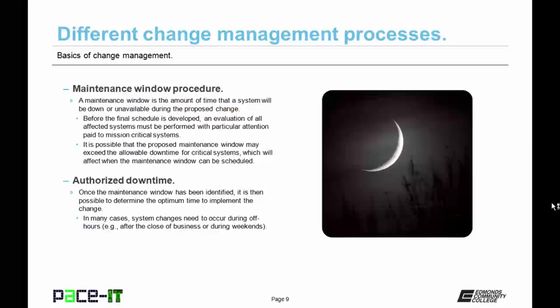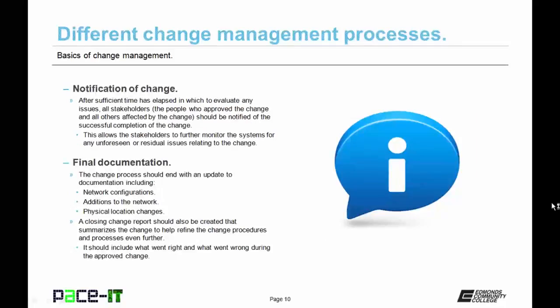A sub-procedure to the maintenance window procedure is authorized downtime. Once a maintenance window has been identified, it is then possible to determine the optimum time to implement the change. In many cases, system changes need to occur during off hours — after the close of business or during weekends — when systems are not utilized as much. Then there's the notification of change procedure.